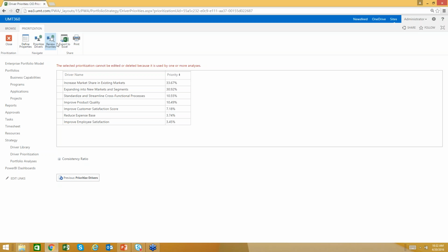Also, what the project-driven planning technique gives you is a good framework for aligning investment with strategic priorities. So we need a way of proportionally understanding how well our investment is aligned with our strategy, and this relative score is important for that reason too. If I had $100 to invest in my business strategy, and I wanted to ensure perfect alignment, I would stick $33 on the top business driver and $3 on the bottom business driver. Of course, we're not expecting perfect alignment, but that relative scale gives you the framework, baseline, and benchmark needed to look at proportional spend based on strategic priorities, which is key.